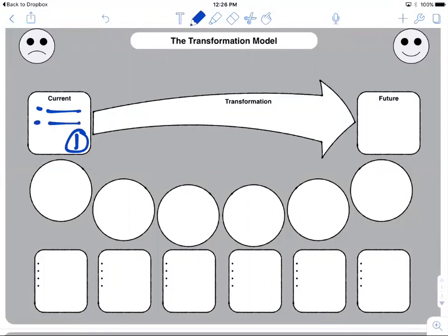And that should really capture the key frustrations and fears and the problem that needs to be addressed, not in terms of how it needs to be addressed, but specifically in terms of the situation that that problem causes and that people are having to deal with. Step two is to identify the future state, once again, either in dot point form or descriptive terms, that are outcome driven results from the project.